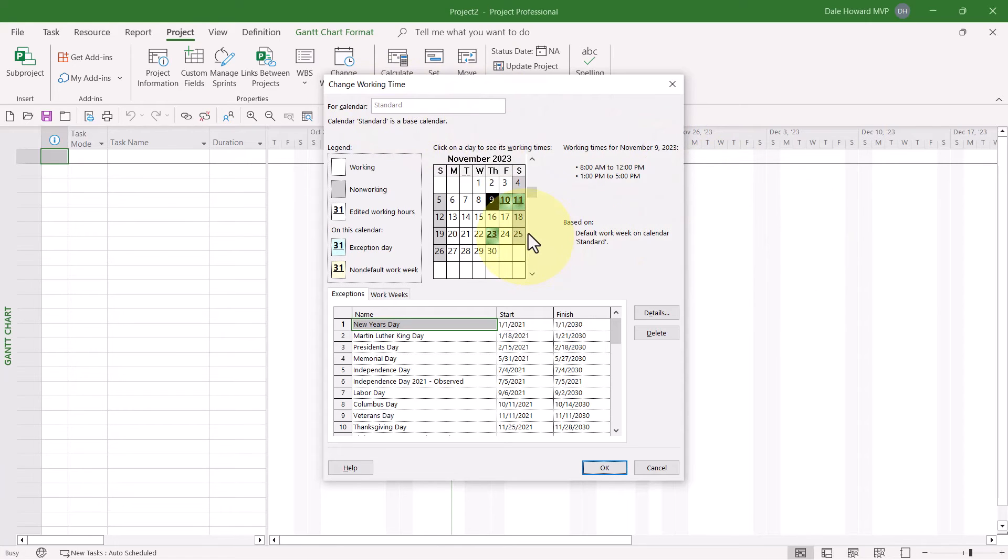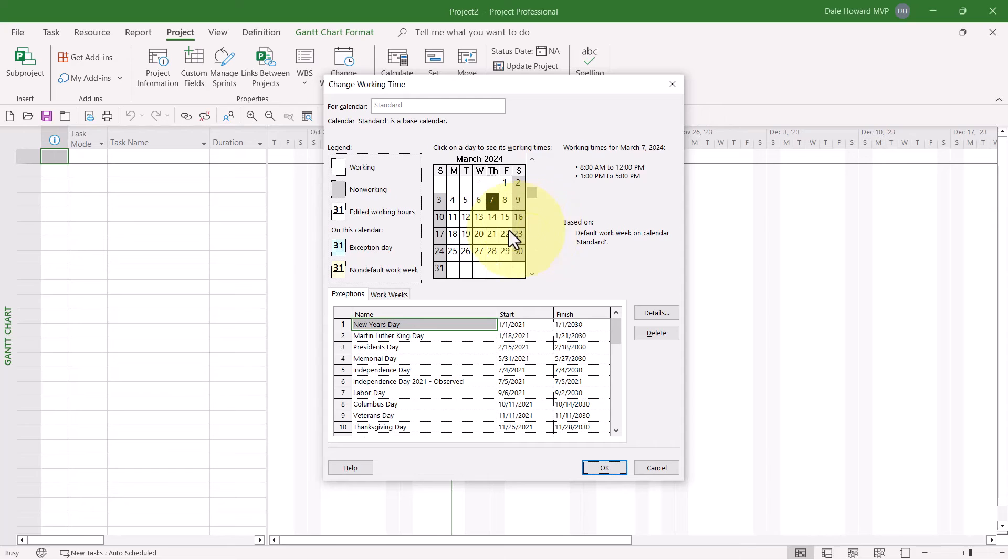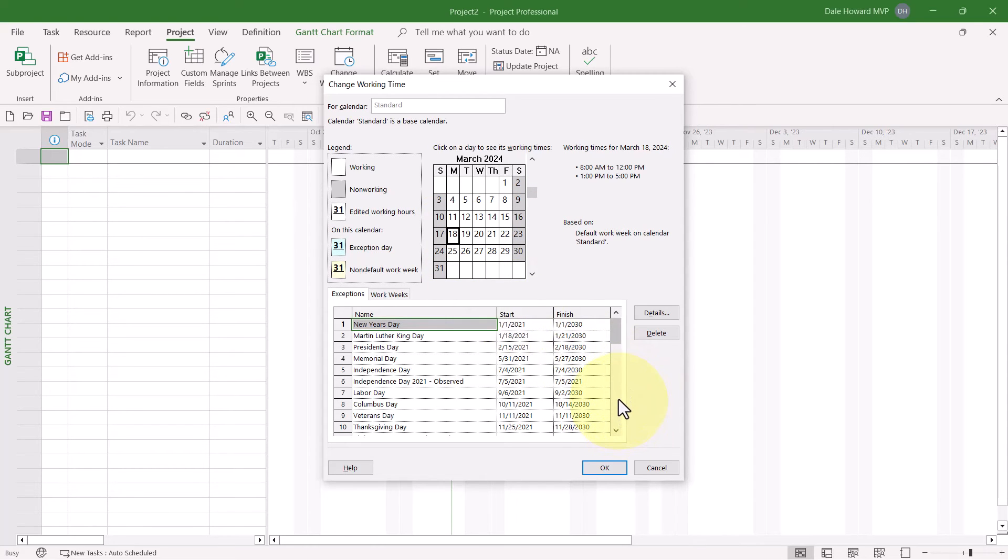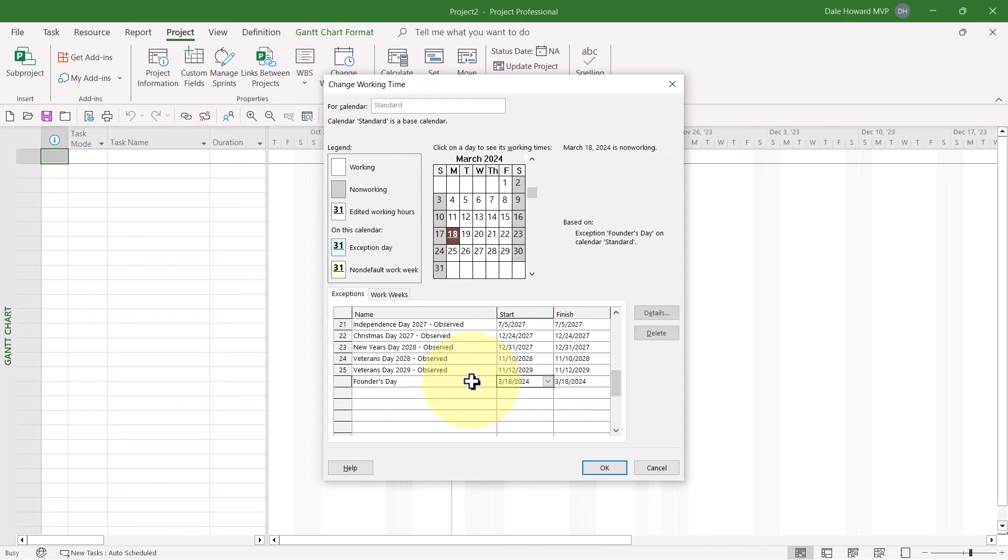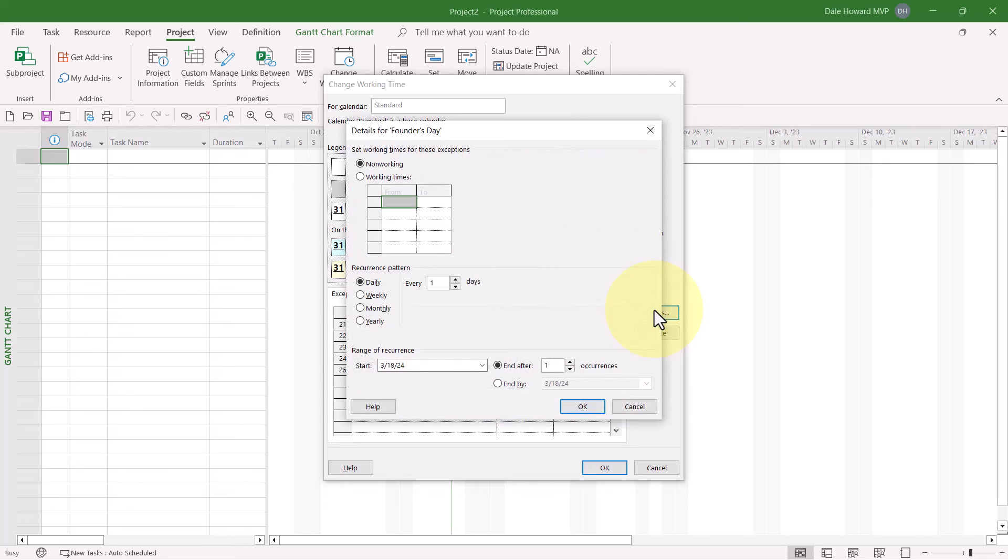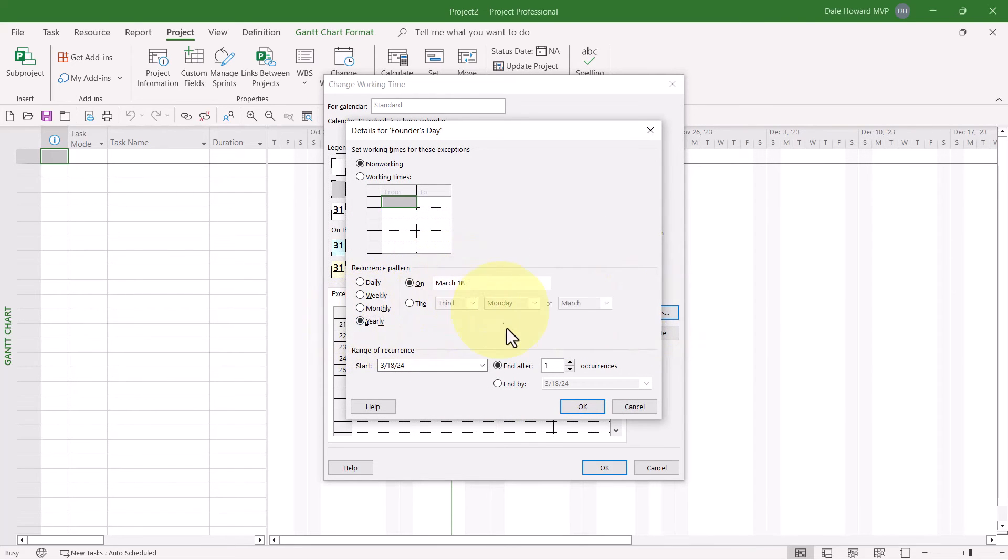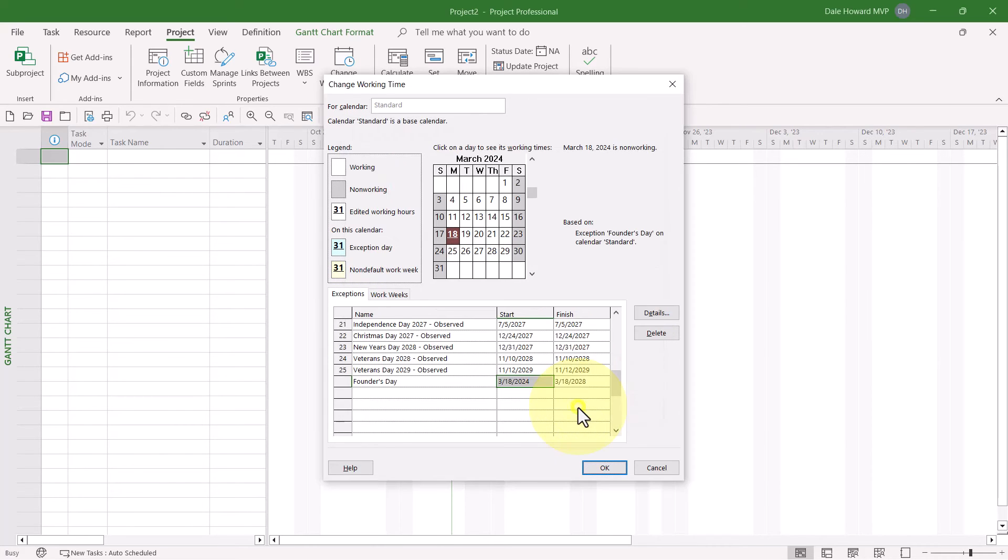In the calendar grid, let's scroll to March and select March 18th, a company holiday we call Founder's Day. Let me put in Founder's Day and make this recur for the next five years. This will be a yearly holiday on March 18th. I'll put in five occurrences and click OK.